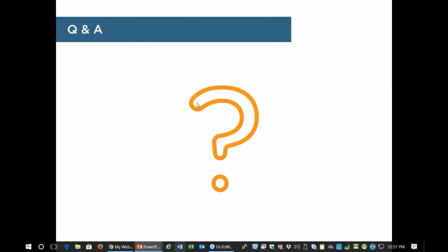If you're a small team, if you're a startup and you don't have the funds to hire a dedicated systems engineer, then that's a situation where you might want to allocate an electrical engineer or a mechanical engineer as the systems engineer. The important point there is that you should specifically assign a person on the team to that role. Even if it's a very small project, assign someone that role so that someone is responsible for doing those things. Even if they're an electrical engineer and they don't understand the mechanical side of the design very well, if they are responsible for making sure that those decisions between allocating solutions to mechanical, electrical, or software are made, then they will at least have some control over that, and someone will be looking at it on your project. Something is better than nothing.